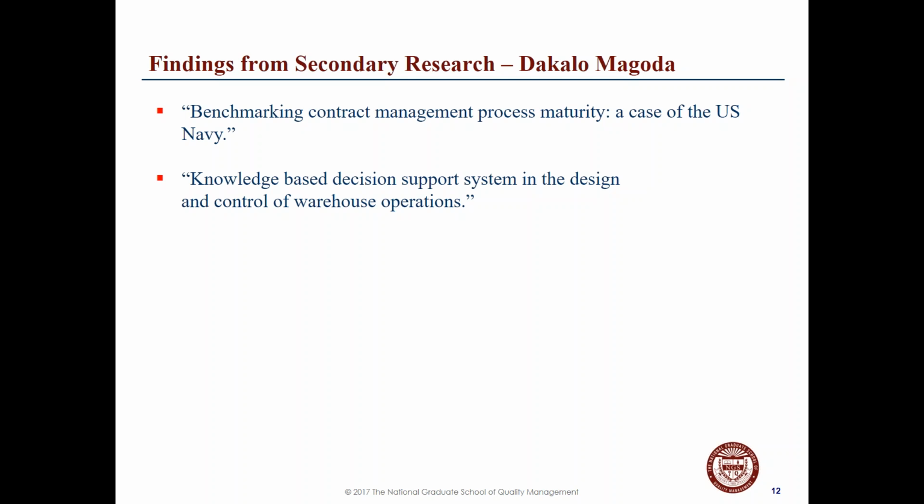So how we'd apply this to our MVP is through contract process improvement initiatives, procurement improvement, ensuring that money is spent in the most efficient and effective ways, and identifying gaps in performance, contract process, and procurement process. The learning points from this article were that higher maturity levels are shown in the pre-award contracting focus points, areas such as procurement planning, solicitation planning, and source selection, and lower maturity levels when it comes to the administration of contracts and the closeout, which shows the best practices are applied in the planning phase and poor dedication to the processes shown after contracts are awarded to vendors.